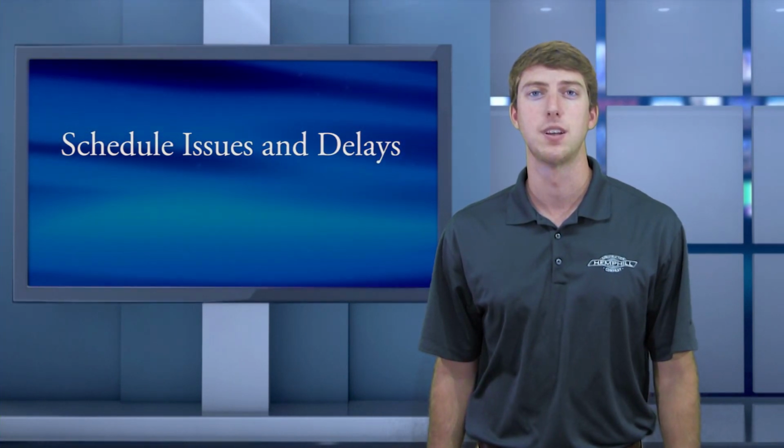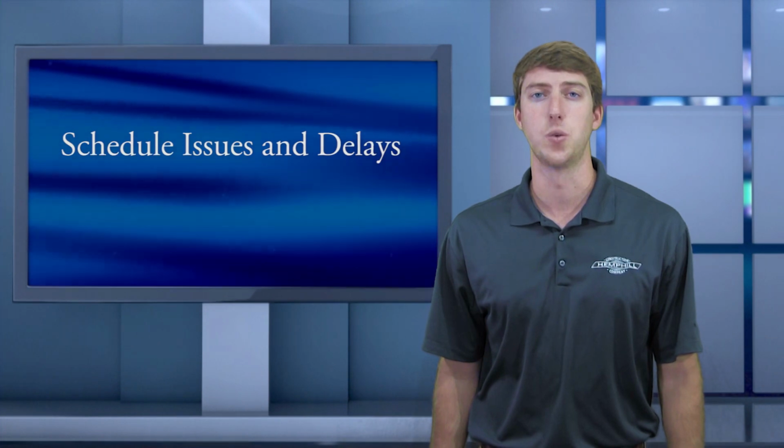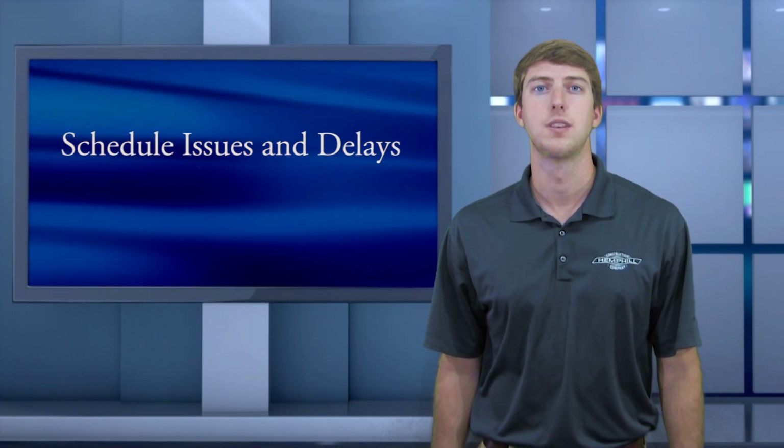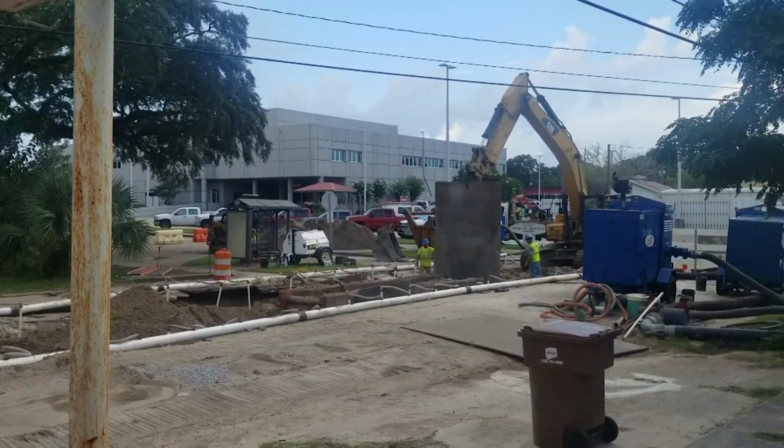To give you an update on some challenges that we've had throughout the project, we encountered some AT&T phone cables on Biloxi, north of Howard, that delayed us in that area longer than we expected. We are now continuing laying sewer on Howard Avenue and are past that challenge.